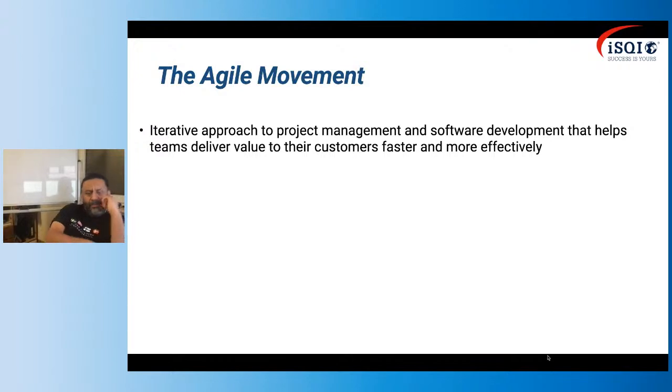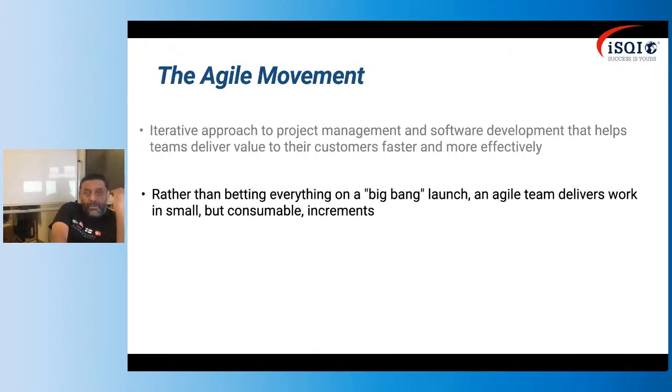There is a comparison between waterfall, Agile, and DevOps, and the difference is only the frequency of the deployment of the software. In the waterfall methodology, normally the deployment of the software is made after 3-6 months, maybe 1 year. Using Agile methodologies, the deployment of software is normally after one iteration, which can take about, I don't know, maybe 2 or 3 weeks. And using DevOps, the deployment of the software can be really continuous. This is exactly what DevOps takes from the Agile movement.